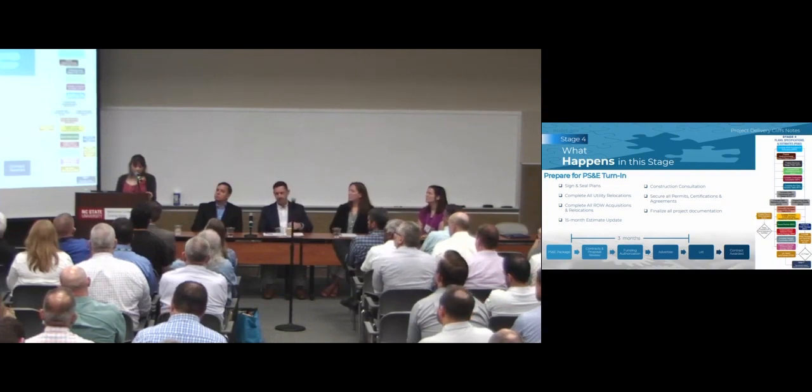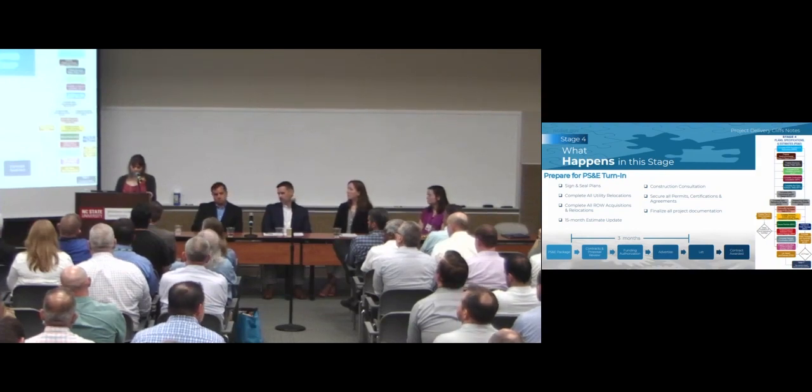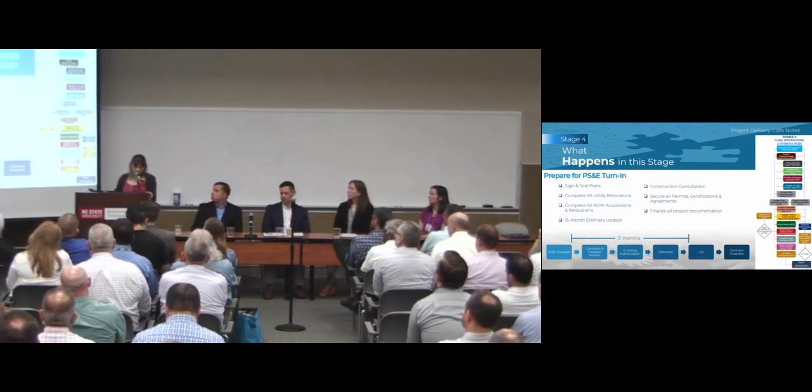Also, finalizing coordination on all your permitting, certifications, and agreements to make sure they are signed prior to your PS&E package being submitted. And lastly, all supporting project documentations need to be finalized and uploaded into your key documents on SharePoint.